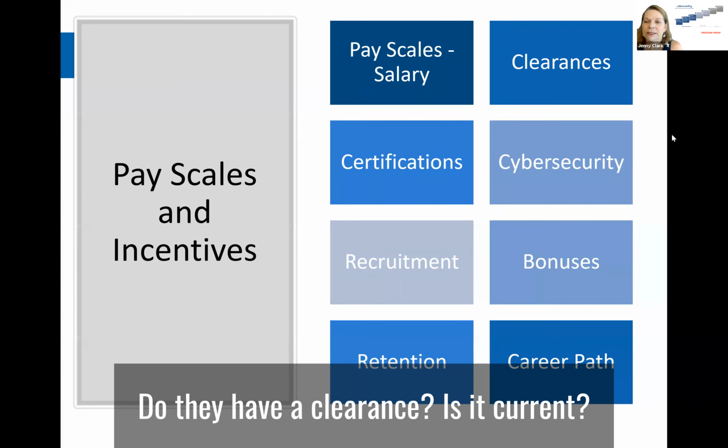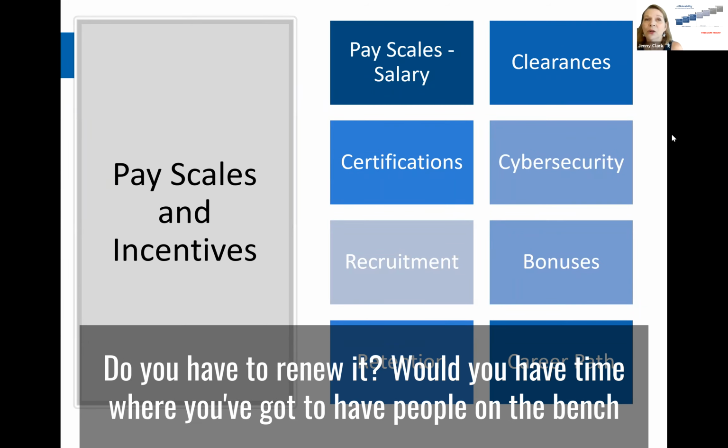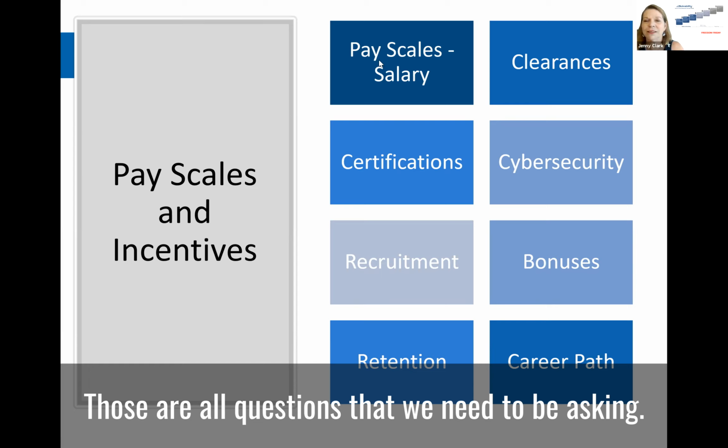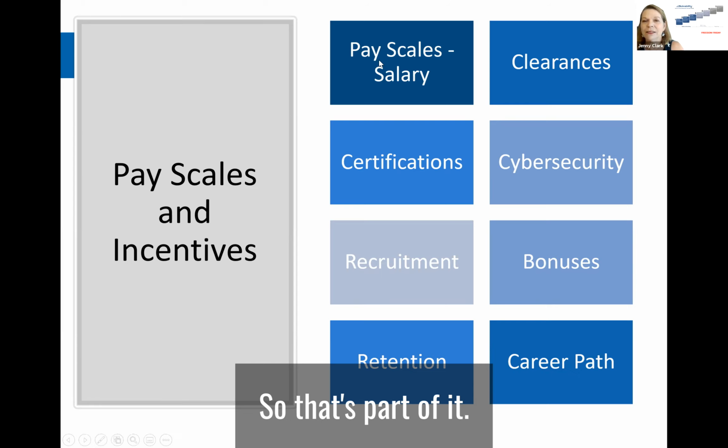Do they have a clearance? Is it current? Do you have to renew it? Would you have time where you've got to have people on the bench while you're waiting for their security clearance to come in? Those are all questions that we need to be asking. So that's part of it.